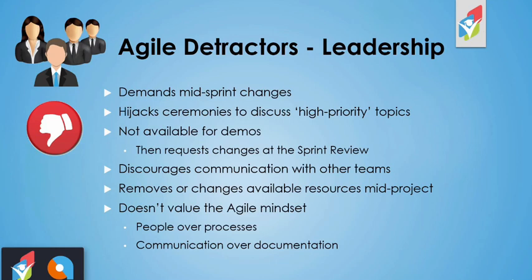If they're working and let's say halfway through a sprint, they have 1 week to go before they're releasing that sprint. Trying to add in new requirements or user stories into that sprint and get them done for the end of the sprint, it's going to cause a lot of havoc because really the plan that's been put in place for how that sprint will be completed and who will be doing what goes up in smoke, and it just becomes chaos. It can cause a lot of problems.